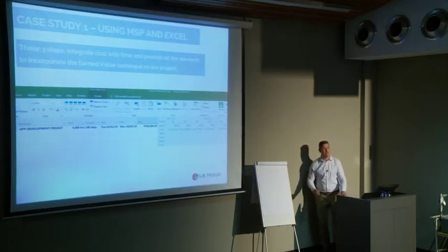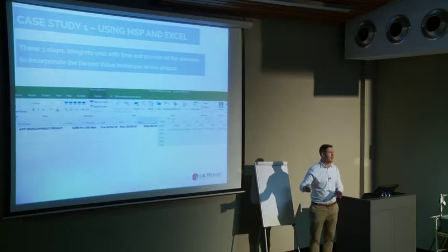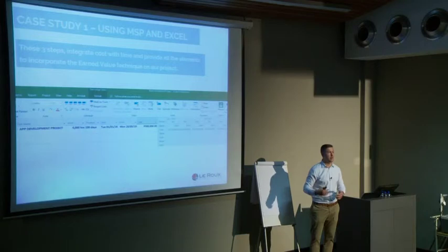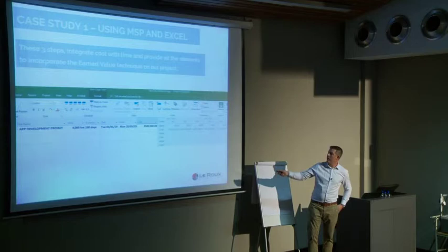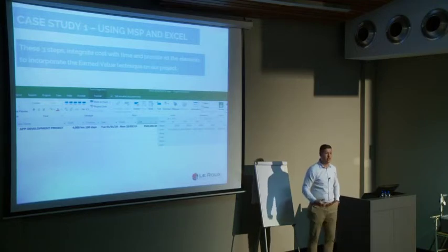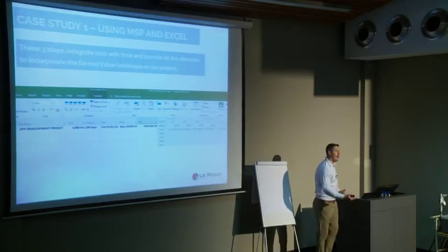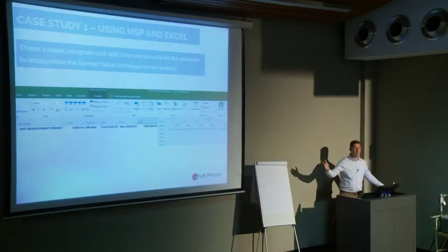It differs now slightly from the 800 per month because I've just used the 1st of January, and obviously I've used 20 days. I mean, there might be more than 20 work days. February, for instance, is only 20. Then we have 22. So it differs slightly, and we're going to end there on the 20th of May. So my hours differ slightly from the 800, but it doesn't matter. So this is accurate, actually. And then I've got my values there in terms of the cost. So this is what it's going to cost me each month for the hours that the guys are going to work. And there's my information. There's my planned value curve. You agree? And that's my objective measure.